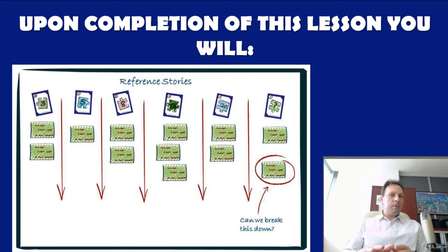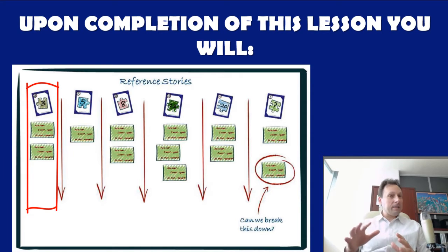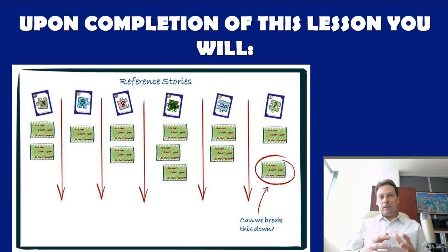The team determines how to best work through the sprint backlog. However, when possible, they should work on highest value items first. Once the team forecasts the number of stories they feel they can accomplish in the sprint backlog, there should be no addition or change until the sprint ends.